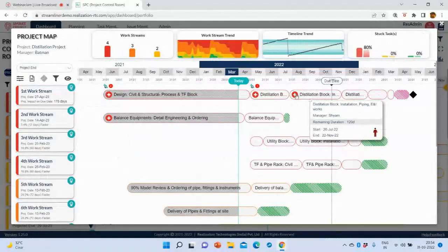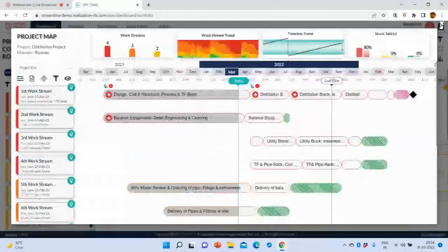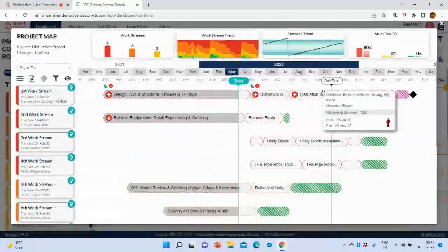So here we have a combined network for all those people working together, but the way of resource allocation is simply to have a combined team dedicated on this box, so that whatever happens inside the box, there is no shortage of resources. So all we are trying to do is either avoid the integration point or avoid a shortage of resources. That's what we are doing by creating these boxes. That's the logic.